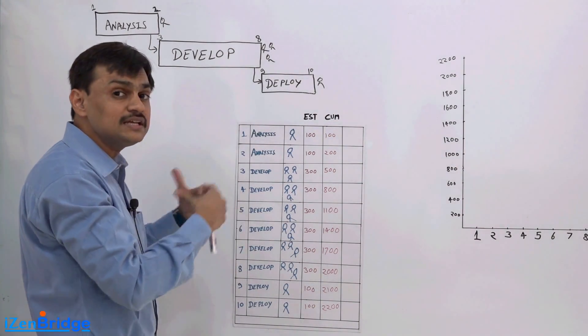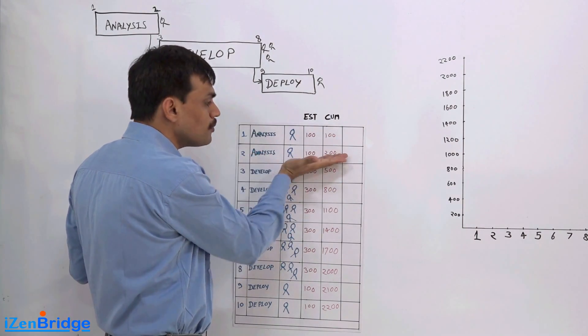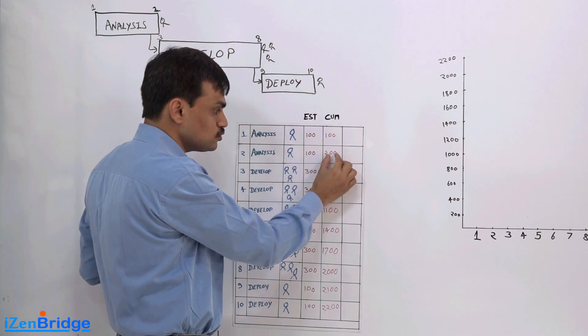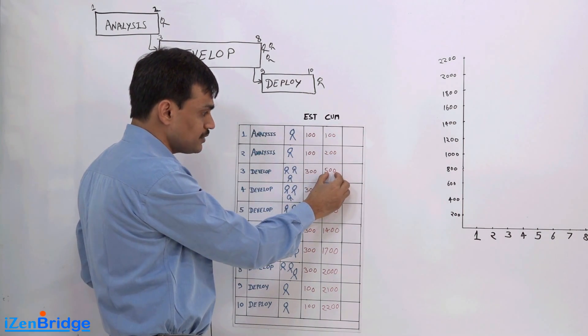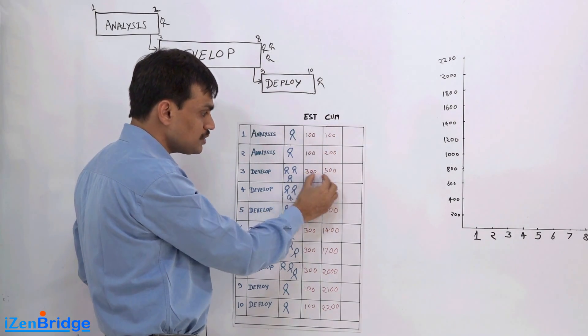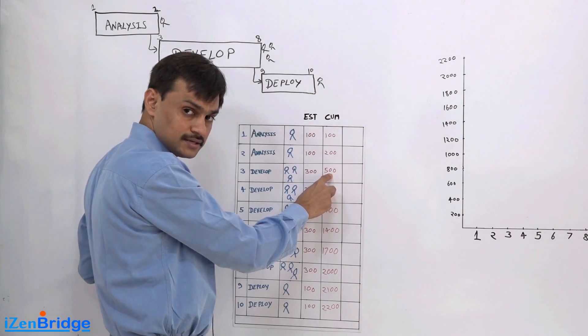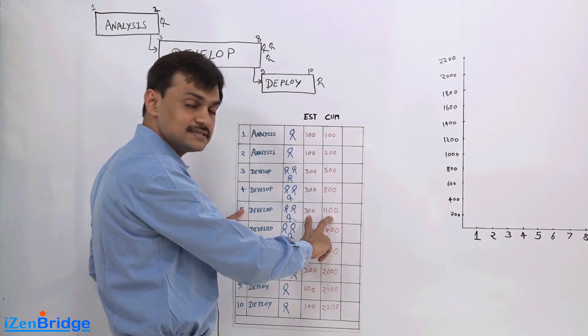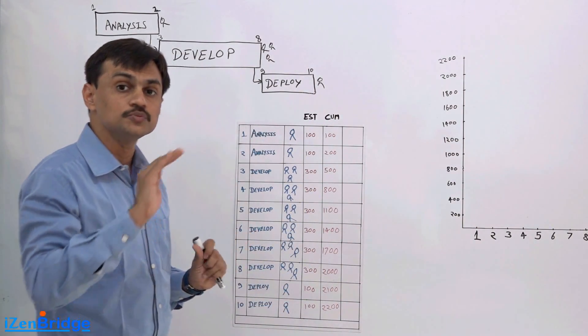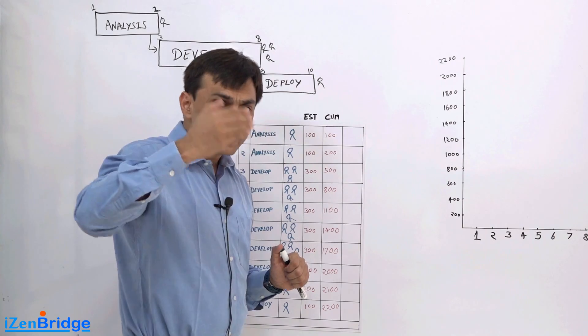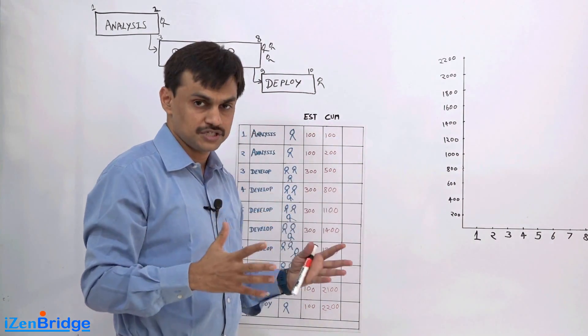Now if I put a cumulative number to it, which is simple, just keep finding out till day 2 how much money I have spent. Day 1 plus day 2 makes $200. Cumulatively by day 3 I have spent $500 because 200 plus 300 makes 500. By day 4, 500 plus 300 makes 800. Day 5, 500 plus 300 makes 1100. This particular column is primarily showing the cumulative money by a given point of time, how much money I would have spent because we are working on the budgeting part of it.